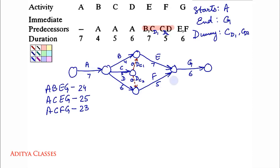Then there is the last path: A, D, F, G. Duration: 7 and 6 — giving 13, and 5 — giving 18, and 6 — giving 24. Let me check once again if there are any paths I have skipped. I have covered all four paths.